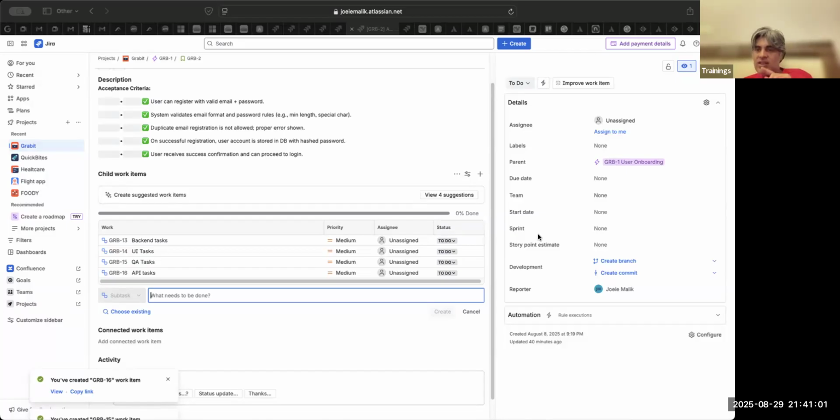Then Chavan sir says 6. 6 is not a possibility, Chavan sir, because this is a Fibonacci series. You can only use 1, 2, 3, 5, 8, and 13, maybe a 20. Remember, we are using a Fibonacci scale. Yes, sorry. Now is this 5.